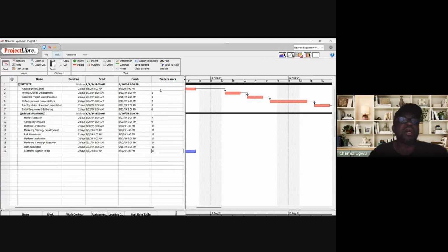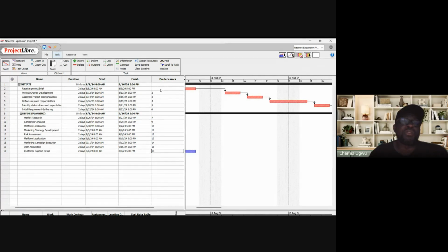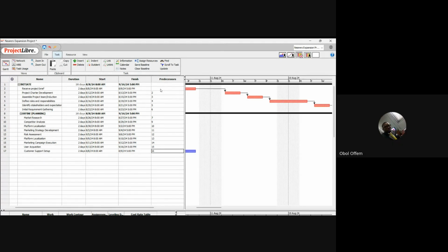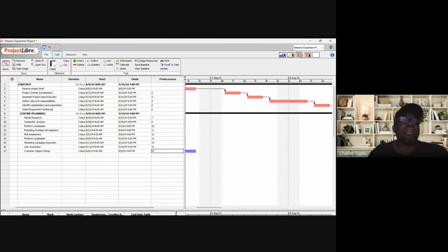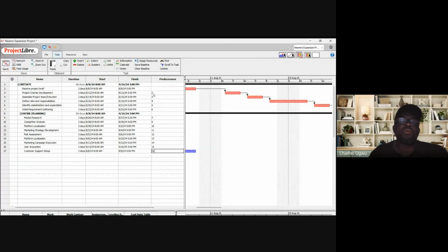That's why if you look at number 2, it has no predecessor. Is there any predecessor before number 2? No, sir. Good. Okay, let's look at number 3. Is there any predecessor for number 3, which is project charter? Yes. That is number 2. Yes. You put the predecessor.